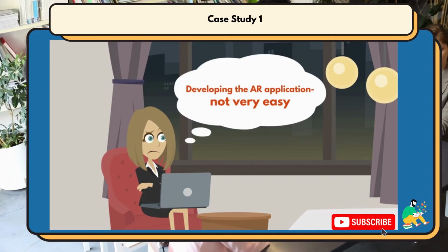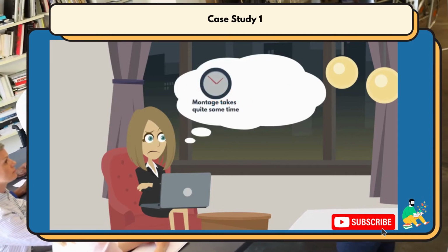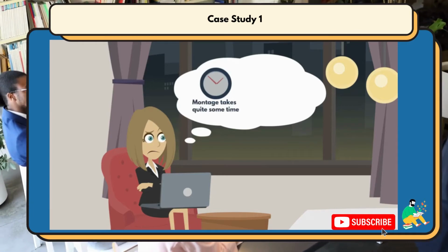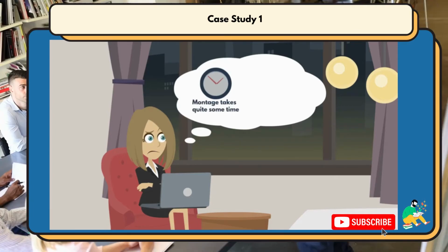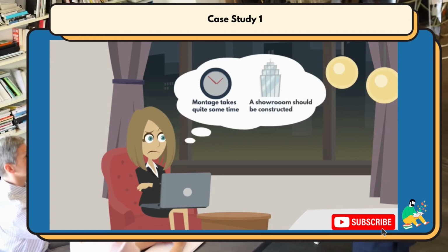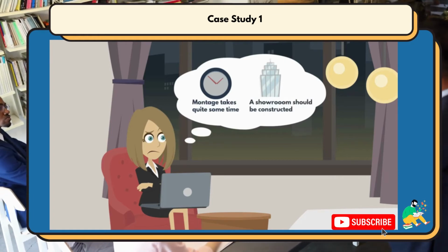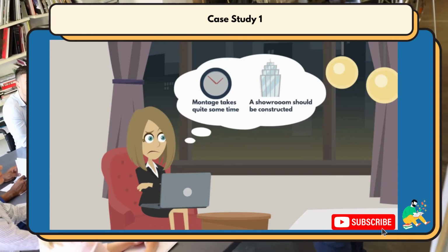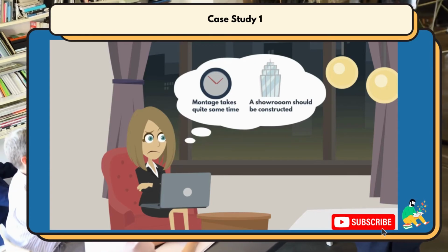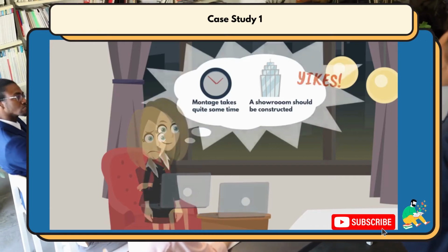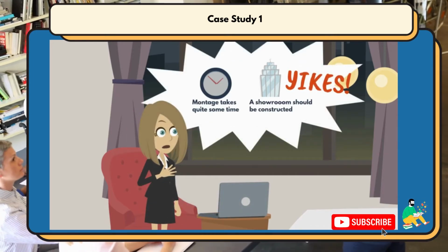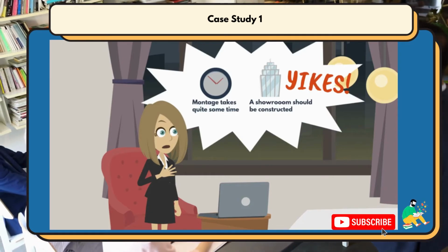Wait a second. I know the mounting of visual effects systems in the exhibition spaces will take quite some time. And they need to be mounted somewhere, right? So the showroom must be constructed before the vendor can deploy and test the new system. That complicates the work. When will the construction be ready? Oh, did I say construction? Yikes. That's right, we need to execute construction.